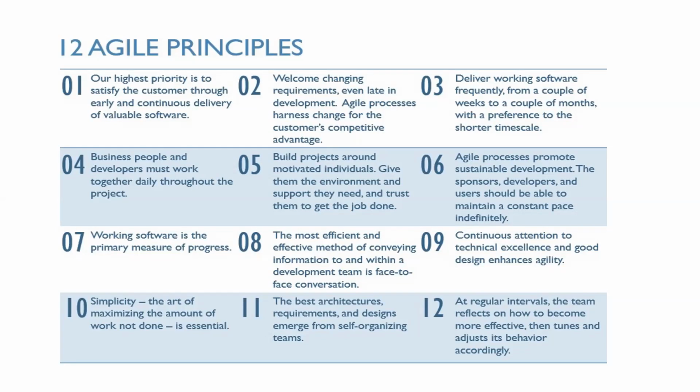So in Waterfall, there's no Scrum Master. In Scrum, there's a Scrum Master, who is technically the servant leader of the Scrum team that protects them, helps them resolve any external or internal impediment, makes sure they have resources they are working on, tracks their output, encourages them, motivates them, and coaches them on agile methodology. That is the role of the Scrum Master. And the layer between the team, protecting them from external influence.